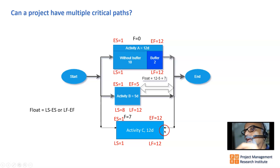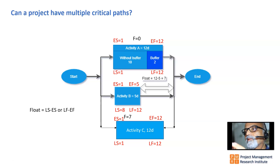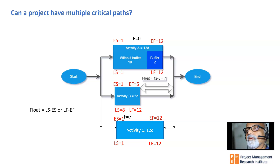Now if Activity C has a duration of only 11 days, its float becomes just one day. Technically Activity C is not on the critical path, but because the float is very small it is a near-critical path item and must be tracked closely — any slippage beyond one day will impact the project end date.